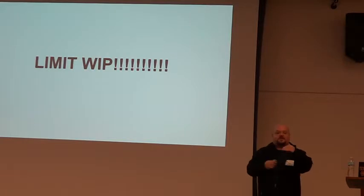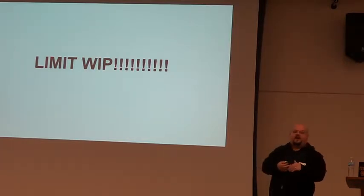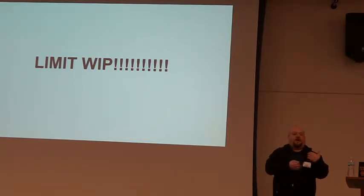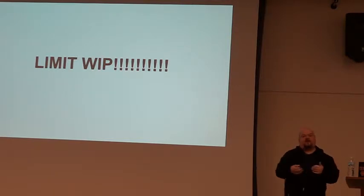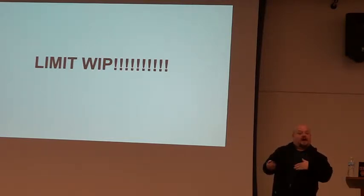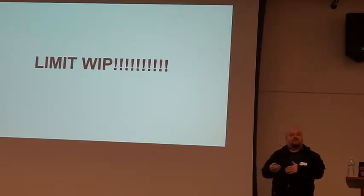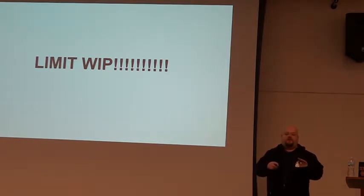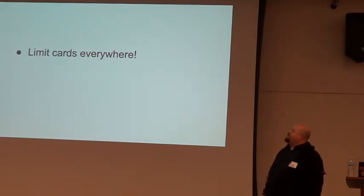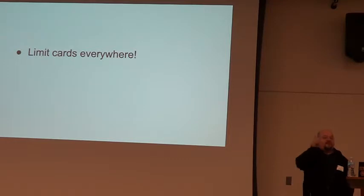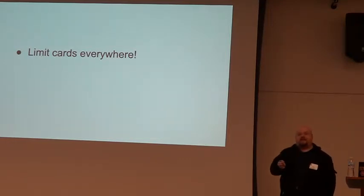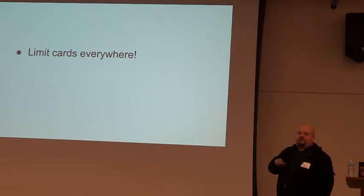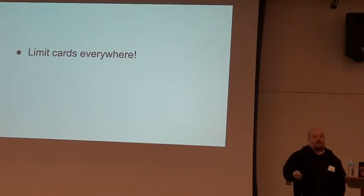And so you can monitor that queue to get an idea of how you're doing in the system. Are you guys not working fast enough in the development cycle? Are the testers doing, are they getting behind too much? Or maybe you should take a dev and move over to testing for a little bit to help keep the flow out and stuff. But we want to make sure we keep up a nice clean system here. And limiting work in progress is this really big thing. So we're going to limit the cards everywhere. Every lane that we have will have some limit. And if you reach that limit, it's a sign that the system is in trouble and we need to look at whether we need to address it.